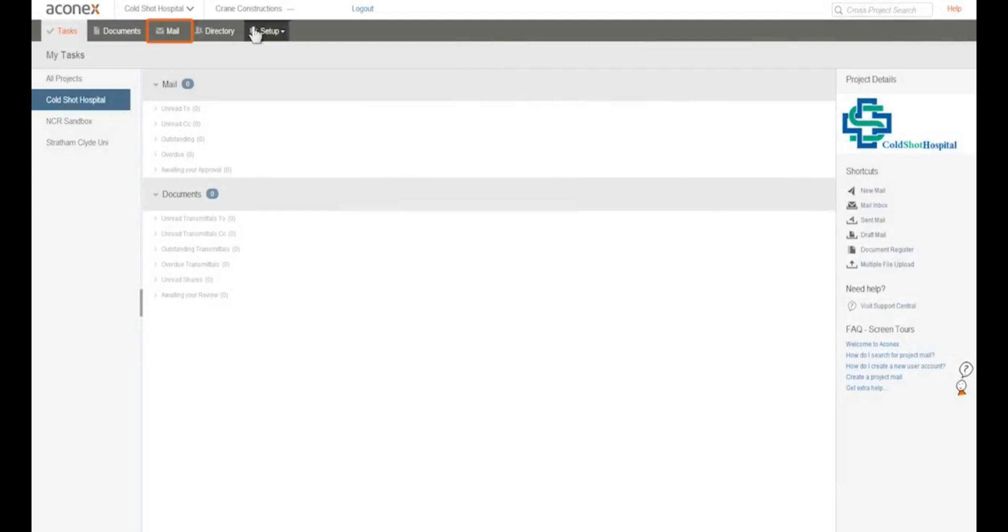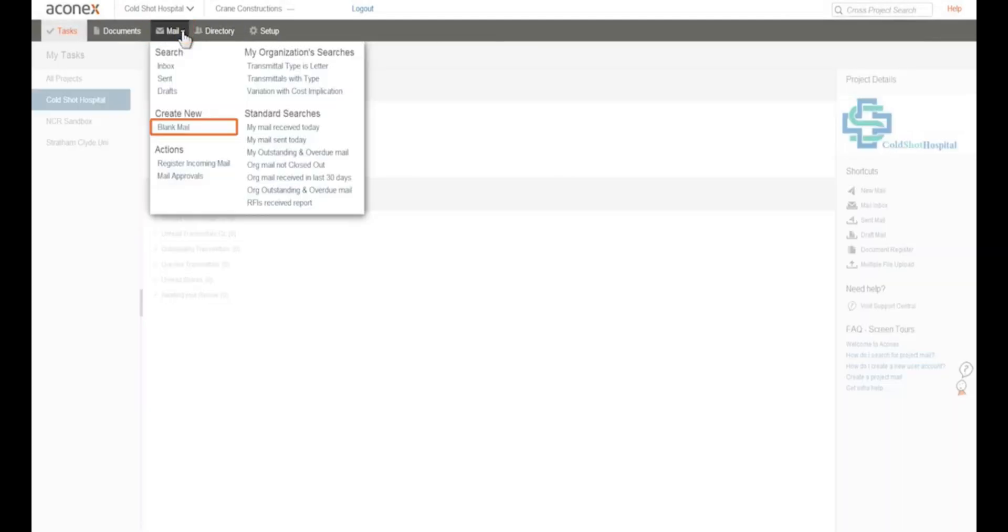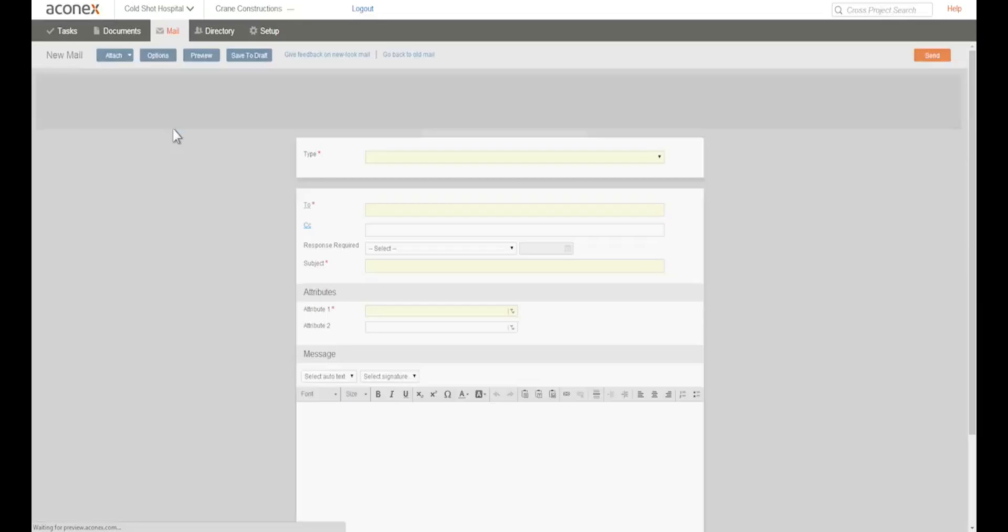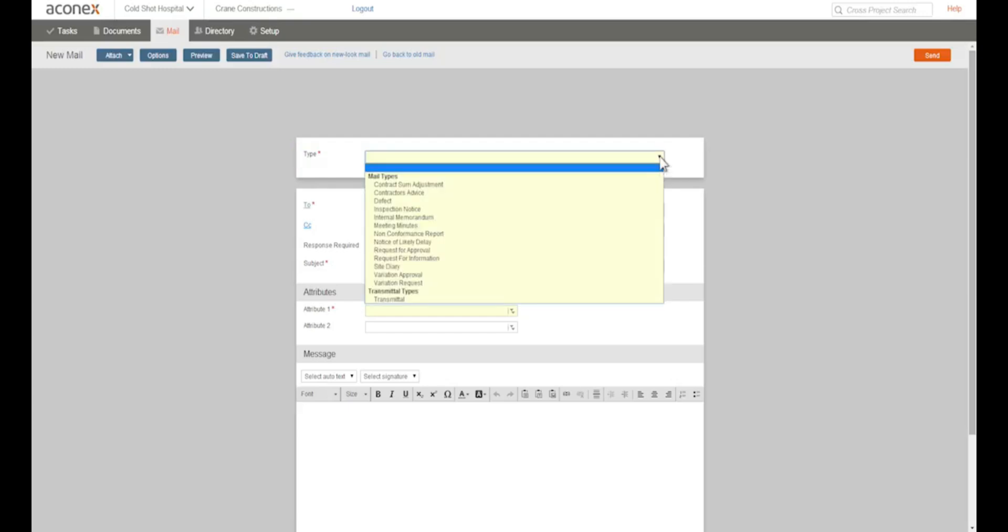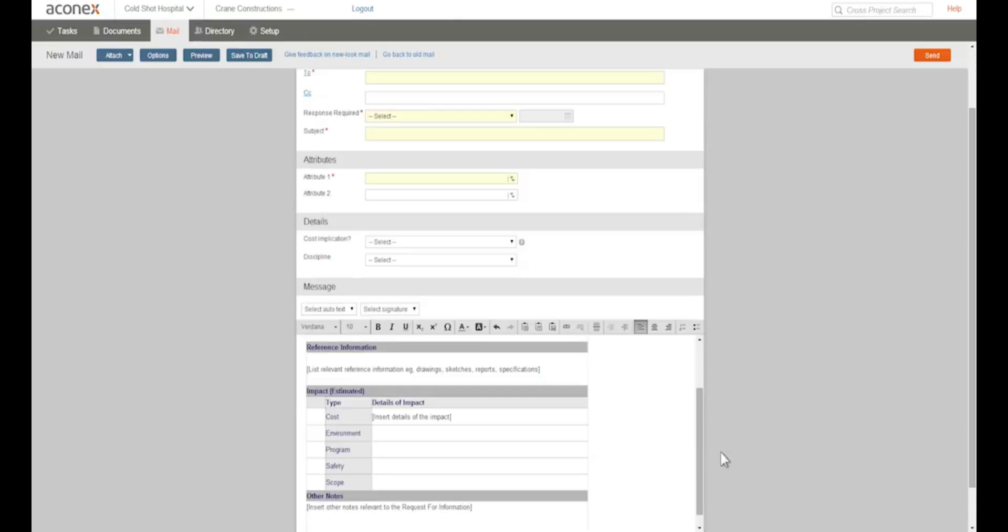Click Mail on the module menu and under Create New, click Blank Mail. First up we need to choose the type of mail that we want to send. Mail types can be configured with autotext which is automatically added to the mail. This is very useful for commonly used forms or clauses in your organisation. Let's choose Request for Information.